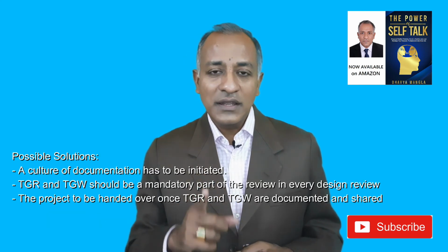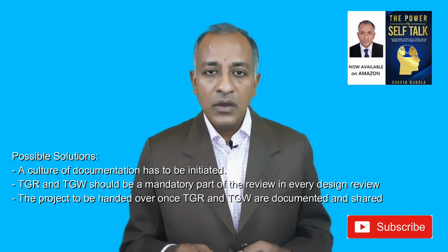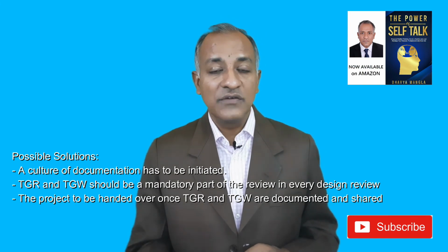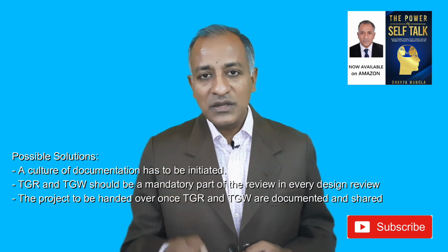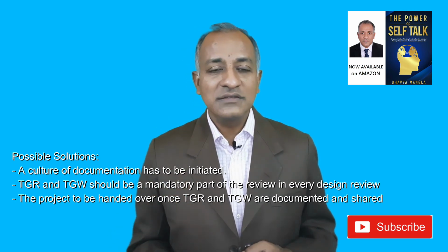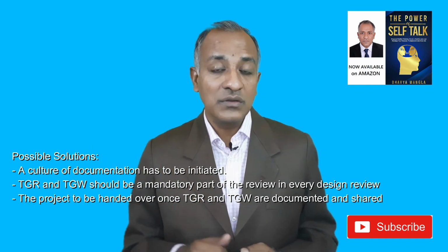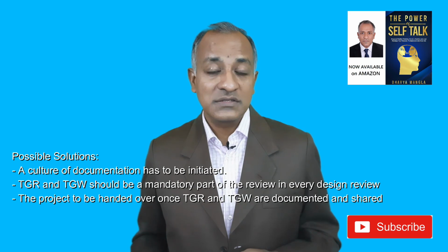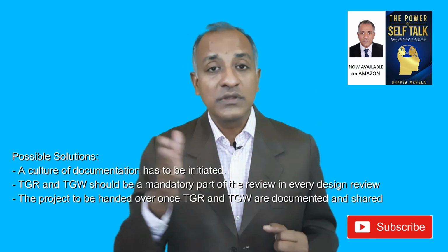First of all, it can be made mandatory that after every phase of APQP, whatever lessons learned there are will be recorded and communicated to the CFT as well as the top management. Once the project is over, lessons learned should be mandatory, and unless and until the lessons learned are submitted, the project cannot be handed over to mass production. Thirdly, whenever a new project is started, unless and until we go through all the lessons learned, the new project will never start.